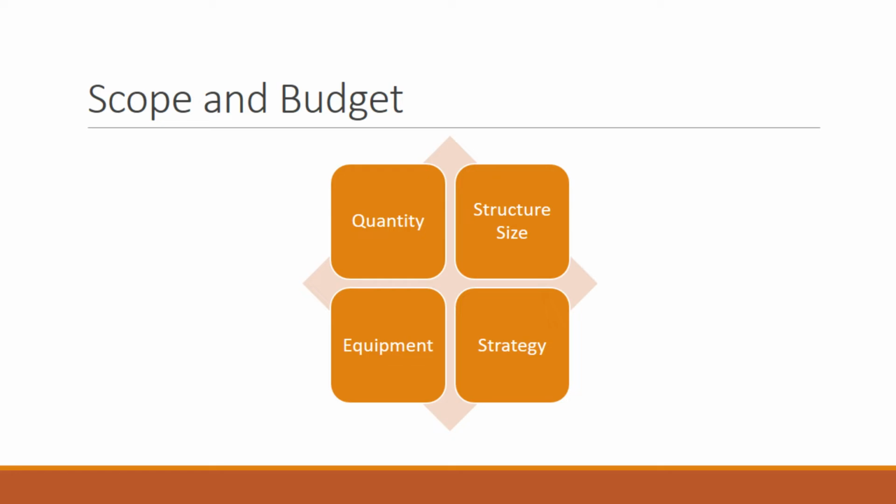And the general arrangements and scope comprise only around 2 to 5% of the design completion and are typically provided to define the previously discussed decisions. An estimate is then completed after the scope development.